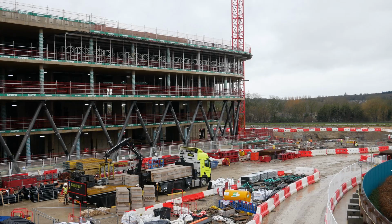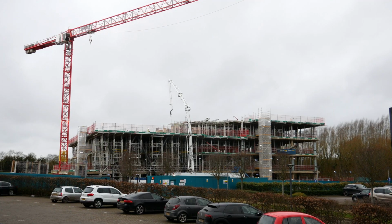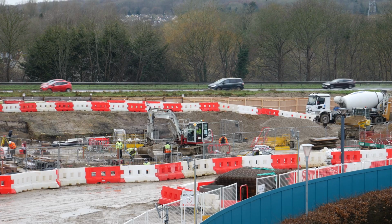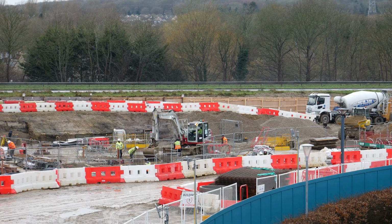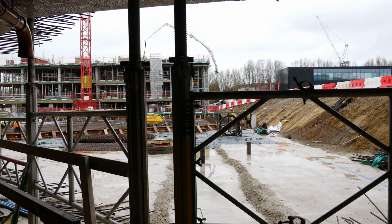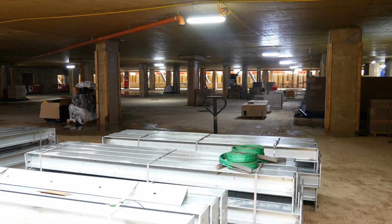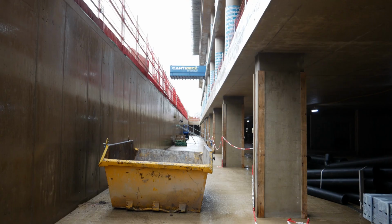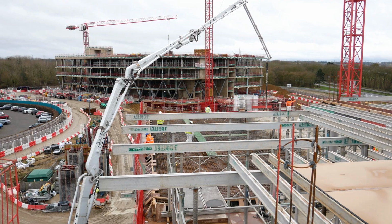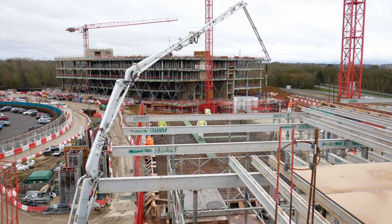My name's Sean McDonough. I'm J. Coffey Contracts Manager for this project here in south of Oxford, the Oxford Science Park. It's 3 very large plots which are currently being developed, and it comprises essentially enabling works to make the site ready to facilitate the construction works, a significant substructure element which is a raft slab which is 500mm in thickness, reinforced with some additional piling structures underneath the cores, and then 3 very large concrete frames, traditional build concrete frames, which gives a 4-storey structure across each of the 3 blocks.